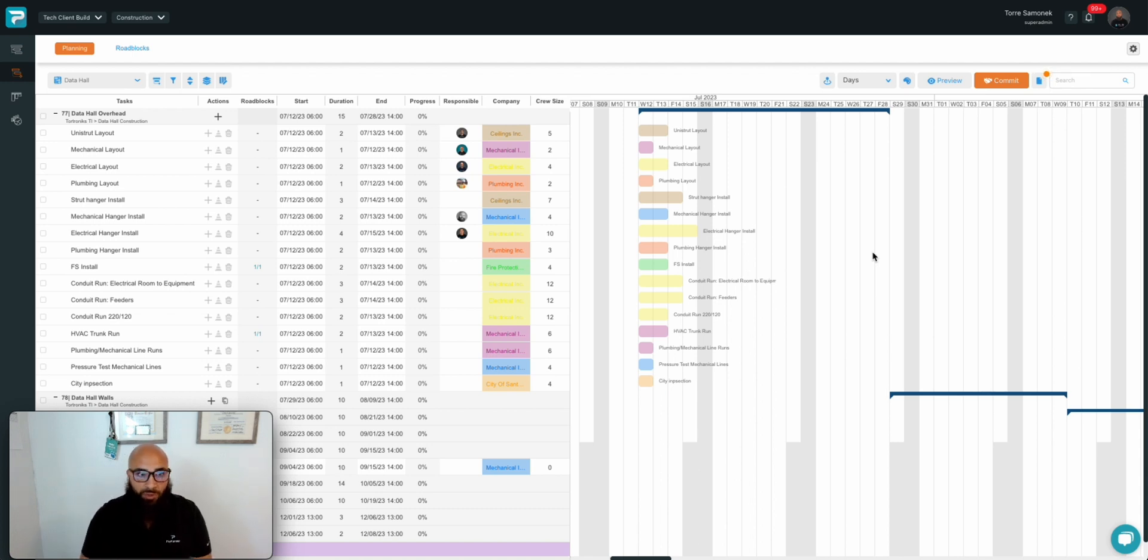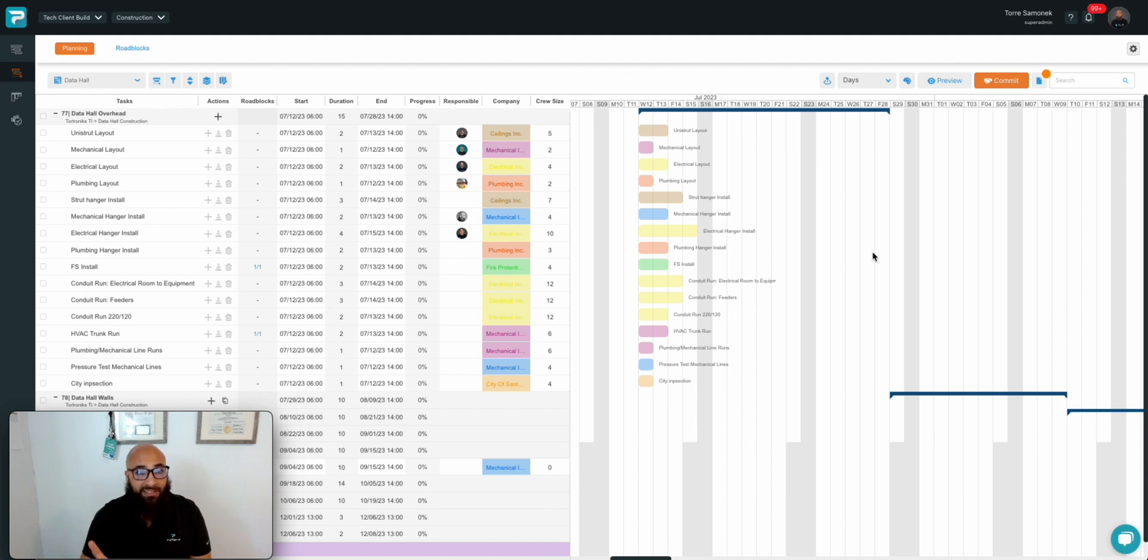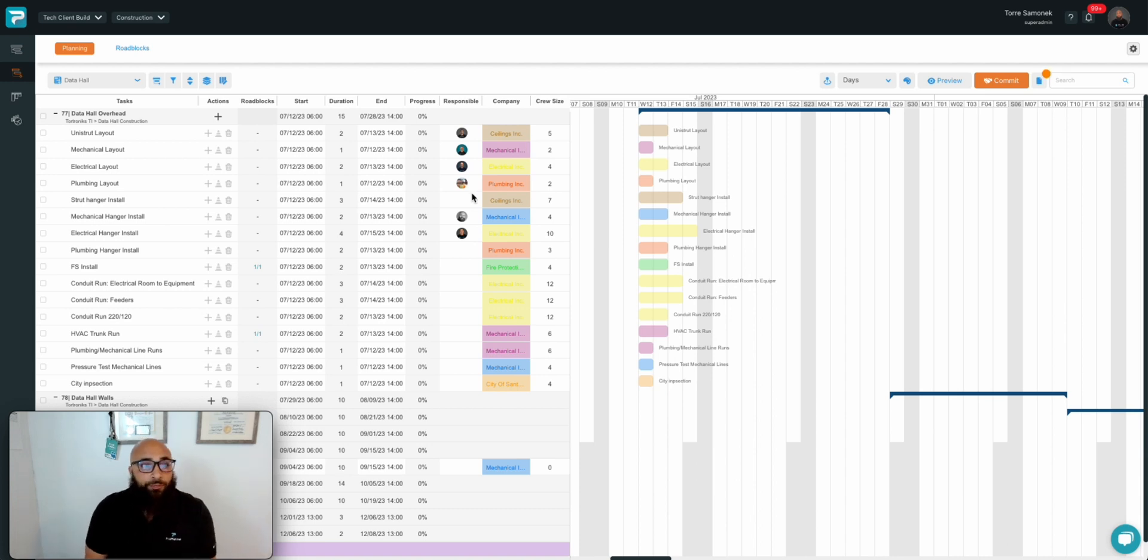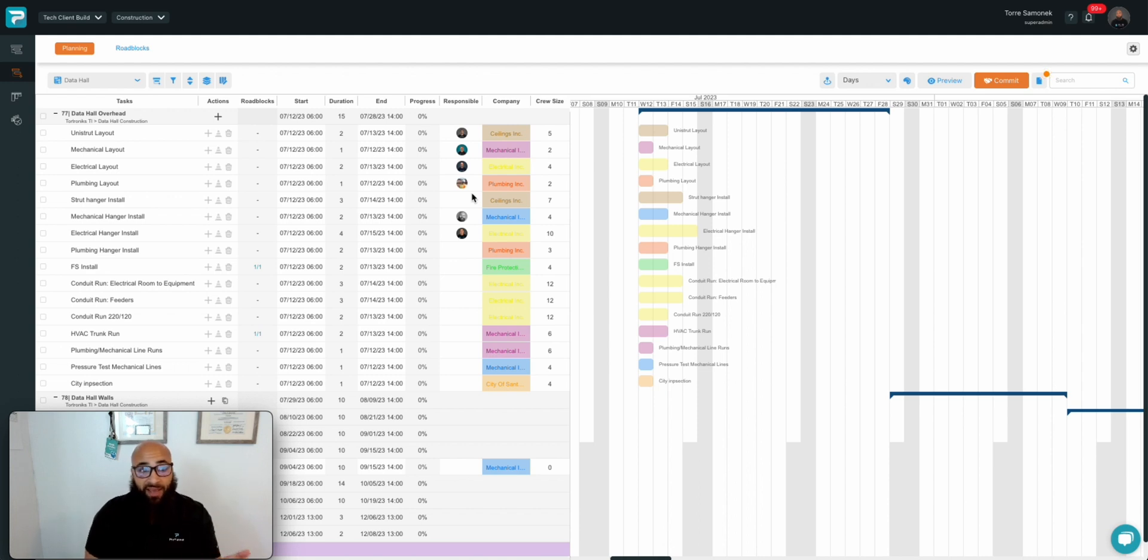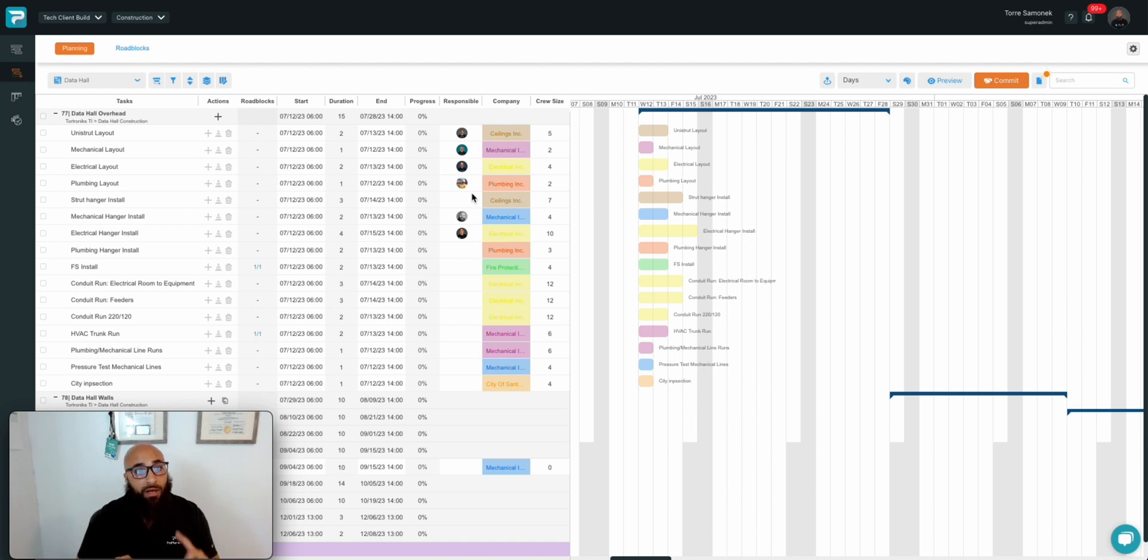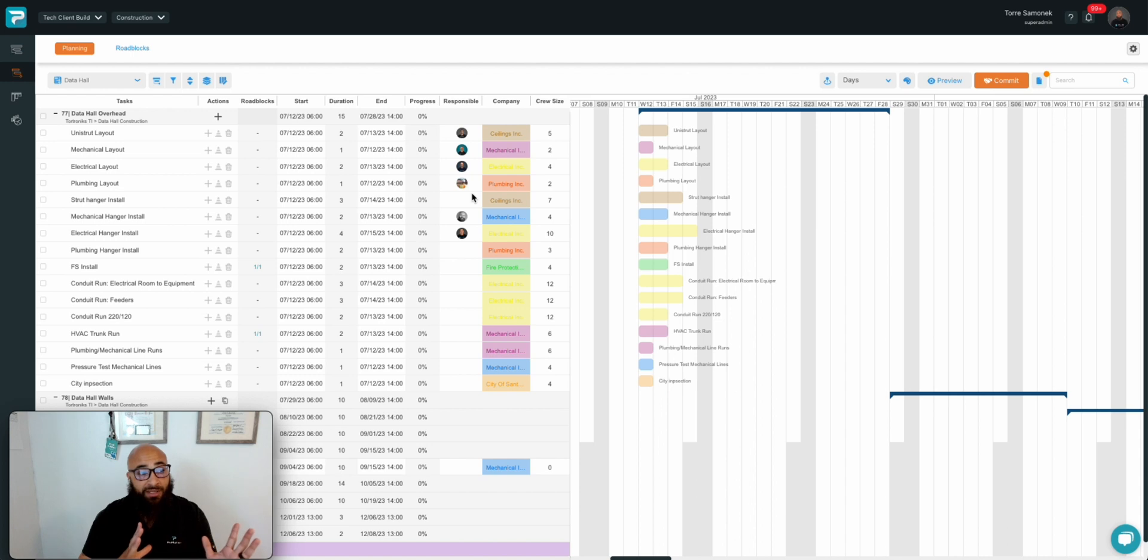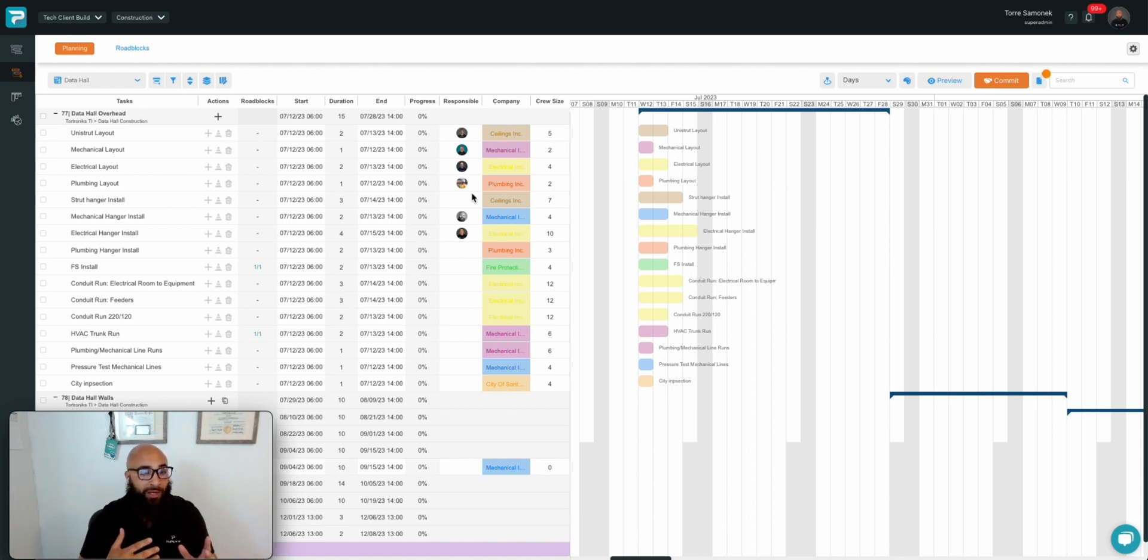In ProPlanner, it's really easy. I'll go ahead and give my trade partners access to ProPlanner. They can access the look ahead, and for the activities they're associated with, they can add more tasks, with the understanding that they can only edit and manage tasks owned by their company. In this scenario, on Tuesday we're having our pull planning meeting, but on Monday, I gave access to all the trade partners to go in and add tasks. We have a nice line of tasks, so when we start this pull planning session, all we need to do is come up with sequencing, identify roadblocks, and figure out how to move forward. We won't need to spend time pulling information from everybody in the room, because that has already been set ahead of time.